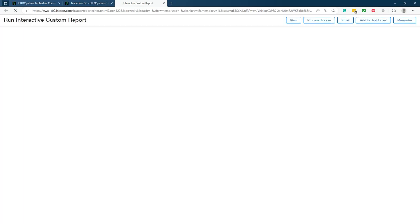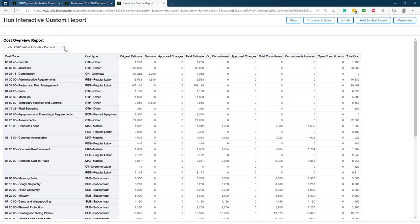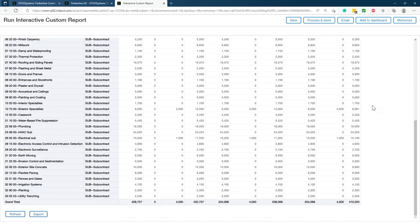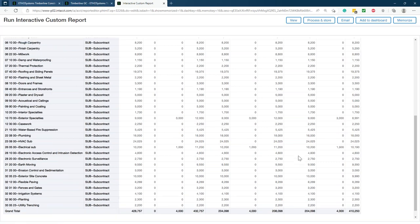This is our cost overview report, which I'm a big fan of. It's run via our interactive custom report writer — something we use heavily at Ethosystems to create custom reports for clients. What I like about this report is it's filterable at the report level by job. It breaks out by cost code and cost type, then gives original estimate, any revisions, approved changes, total estimate, original committed, approved changes to commitments, total committed, commitments invoiced, open commitments, and total costs. You can also refresh it in real time if an entry was just made.